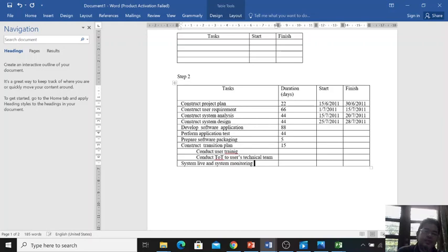Don't execute the system and then you go back. So it is dangerous, because this is a new system which is run in the new environment. So you need to monitor at least 3 working days. So you need to support, or you need to be on-site. Yeah, you have to monitor your user in the field, because they need familiarization and they need help. It is a new system, so you need to support them. Okay, you need how many days? 7 days on site, for example, 7 days.